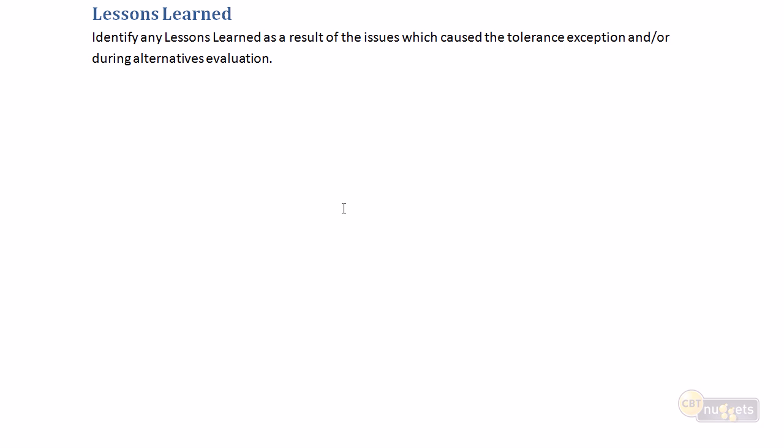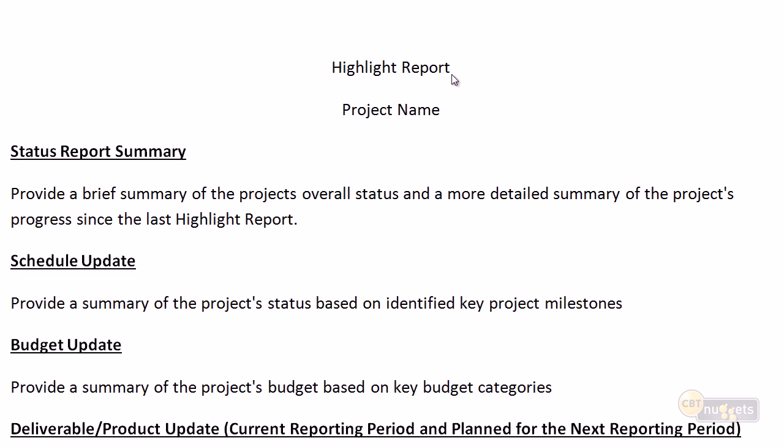The exception report. And next we're going to look at the highlight report. As I said in my introduction, we've already reviewed the checkpoint report. I would suggest the checkpoint report is the detailed, granular status report that you're going to present to your project acceptor and your key project stakeholders, probably on a weekly basis and certainly on a very frequent basis.